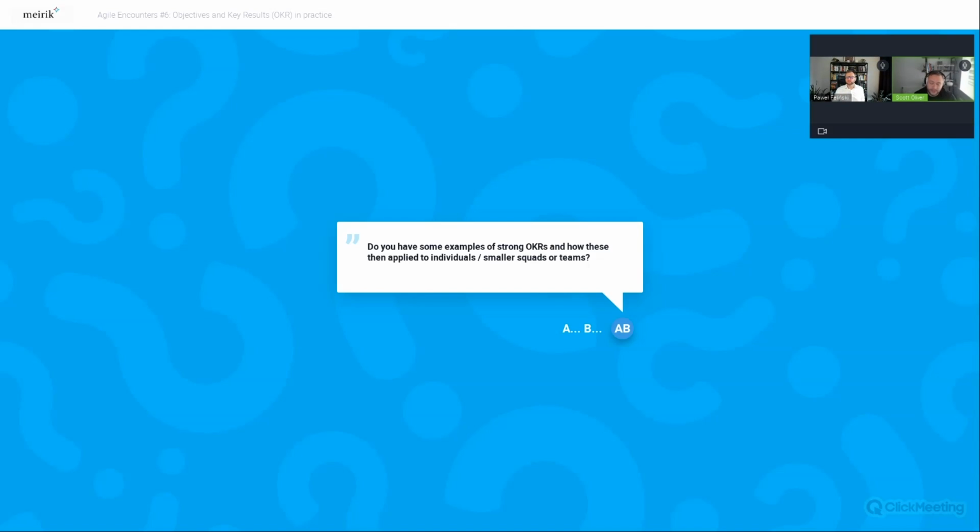They then created some measures collectively. This is at a large scale, so they had 60-odd leaders in multiple workshops where they created key results that they could potentially use to measure, and then they voted on which were the most important, the ones that they think will help achieve these objectives, and then they created some tasks. So that's a couple of examples. The other one was build a leadership team to support the strategy.